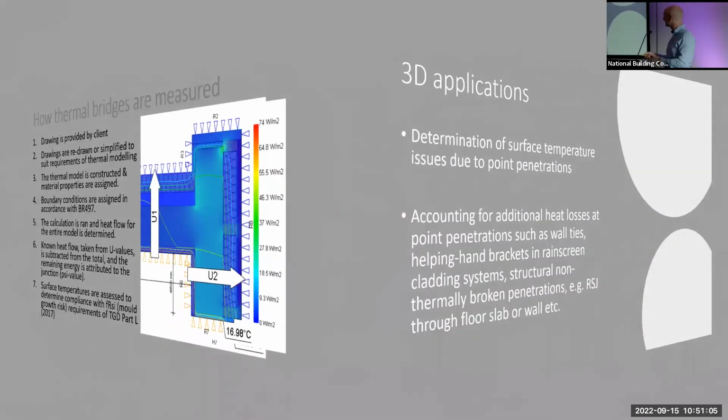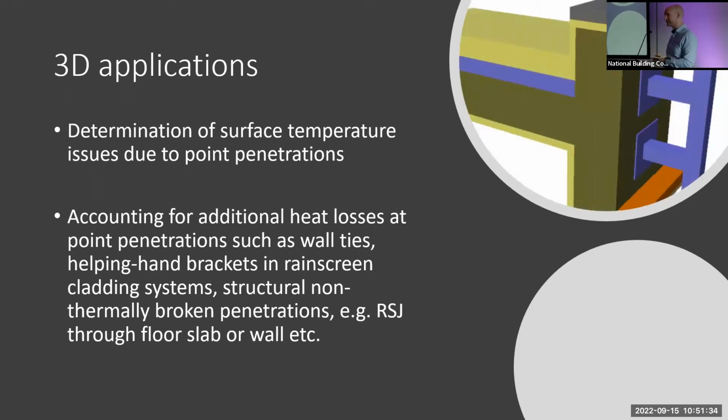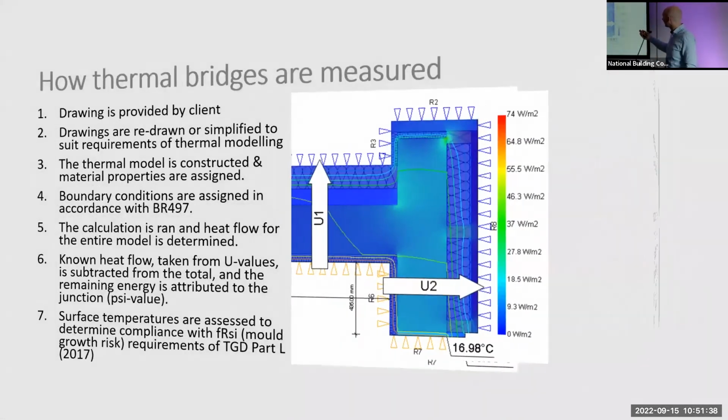And what happens is about 2 or 3 years worth of design work will have gone on. You will not have been part of that as a thermal modeler. You'll get called in about 4 weeks before going to site because commencement notices are going in, etc. And a huge change to the entire design that's gone on for years will happen in this 2 or 3 week space of time. It'll probably make things more complex than they need to be. It'll introduce new costs, new procurement problems, lead times, etc. And so you kind of wonder what the previous couple of years were all about. So just a key point there on the drawing.